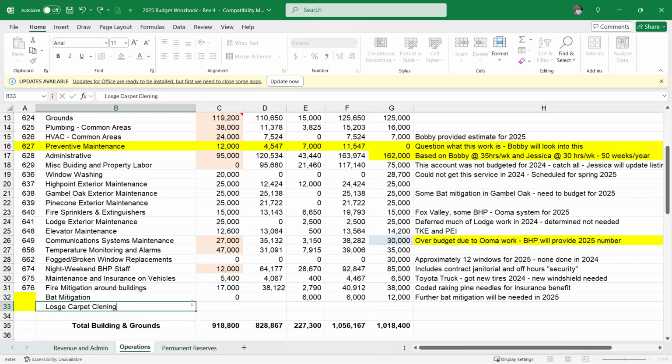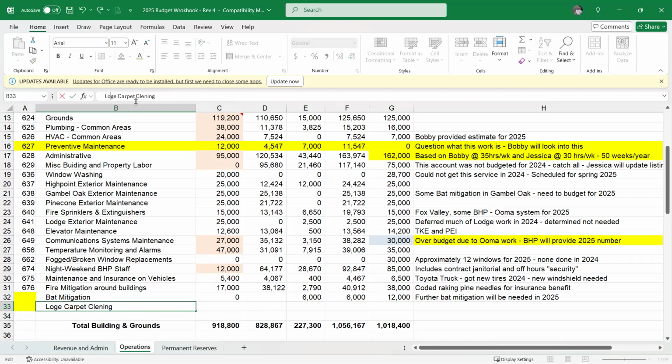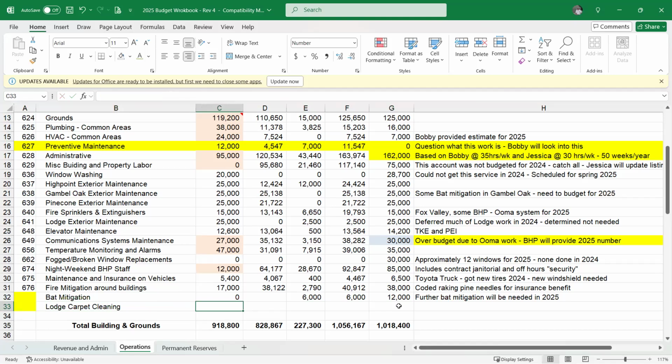And Bobby, just so we can get the number out there and I'll cringe, what was the bid for the carpet replacement? Because I think in the long-term asset plan, it came up in 2 years or so. Yeah, or 3 years. About 3 years. Right now it's at about 150,000. Okay, that's for all of them. That's the number I was kind of batting in my head. Yeah, in that area. That would go in capital projects. Do you want that in this year's budget?